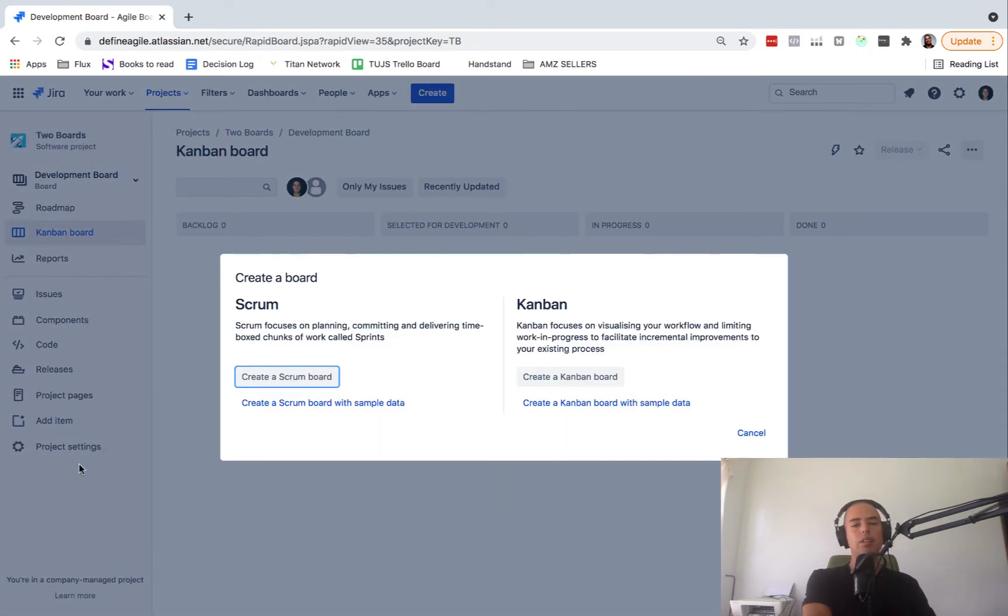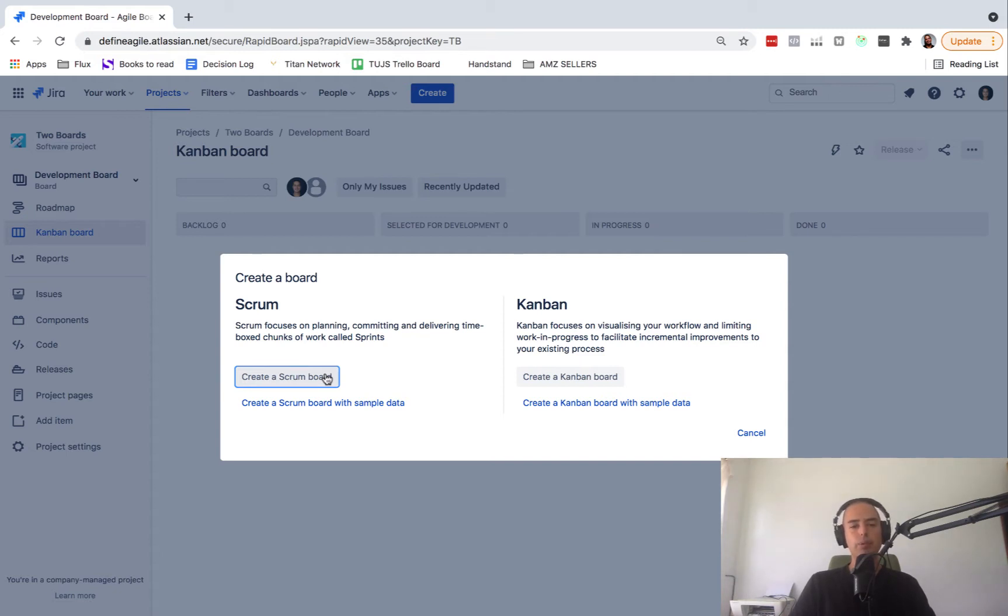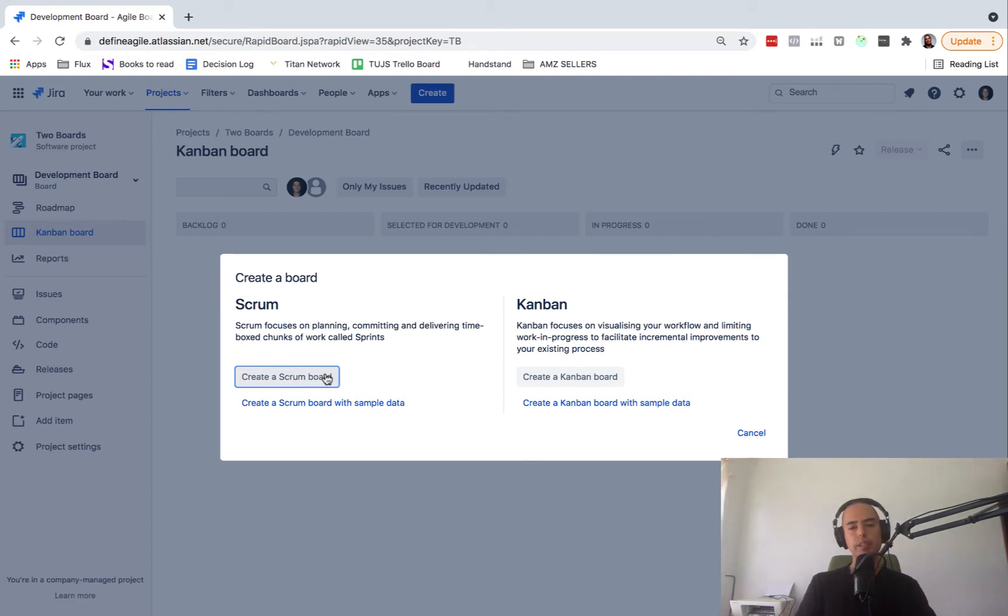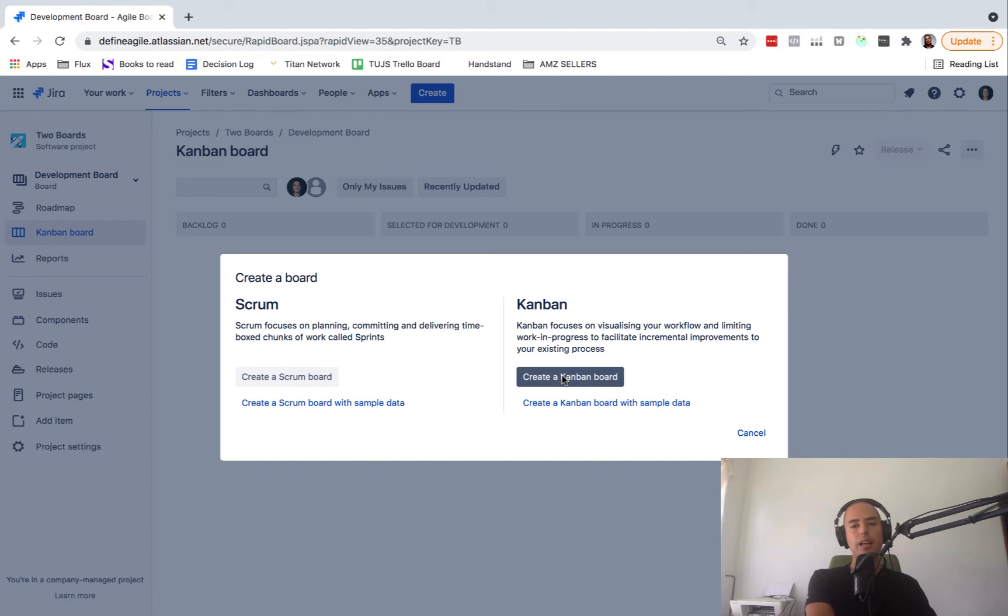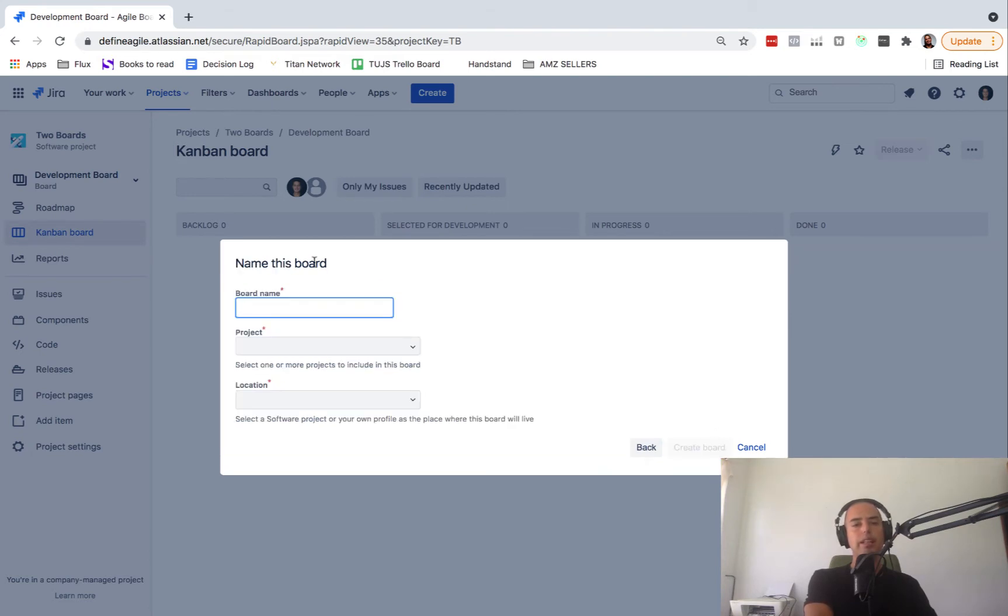It's not really gonna work with Scrum because Scrum requires sprints. Sprints need to be active so it would be hard to do in Scrum. In Kanban it's much easier. You move somewhere to a column, that appears on the other board, and people just can pick it up. In Scrum, because you have sprints, it's not working that well. So for that you'll need to create a Kanban board and both boards need to be Kanban. You can say board from an existing project because you don't want to create a new one. Click next.